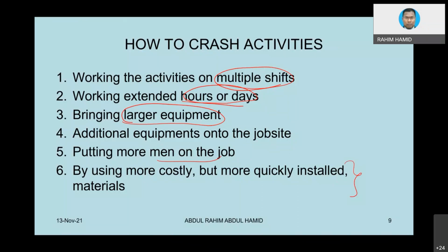conventional. But looking at these kinds of factors here, for sure there will be an increase in costs. So that's how cost increase is almost inevitable. As I mentioned, when we want to compress the project, it looks like bringing larger equipment, we already know the equipment rent will be associated with the capacity of the machine, as simple as that. When you bring more people, for sure you have to pay more. When you work extended hours, for sure you have to pay more.